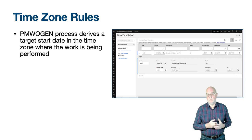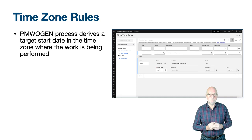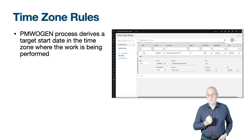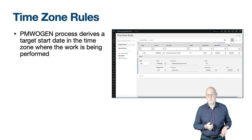Before finishing the section on generating work orders, we should discuss the time zone rules application found in the administration module. Its purpose is to allow processes to derive a date in a different time zone to the user performing the process. Currently there is only one process: PM WoGen, for generation of work orders from PMs. The goal is to generate a PM-based work order with a target start time in the time zone of where the work is performed — normally the time zone of the asset or location. When the user generating the work order has a time zone of Europe/London UTC+0 and the target start time on the PM is 0800, the work order shows 0800.